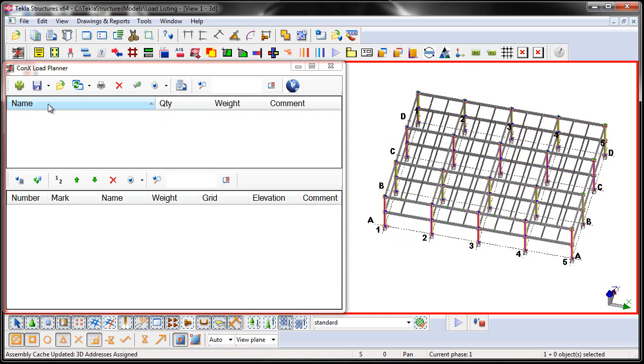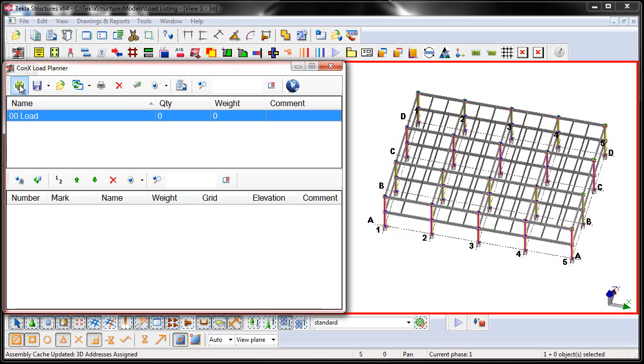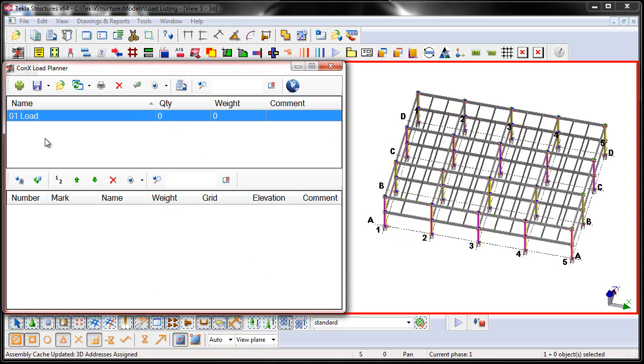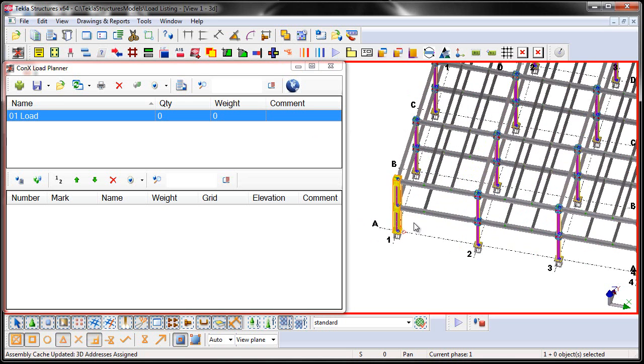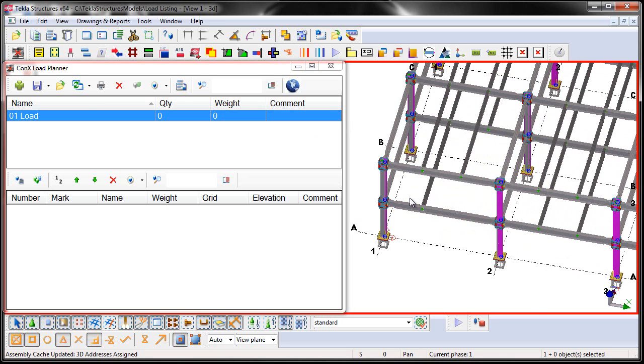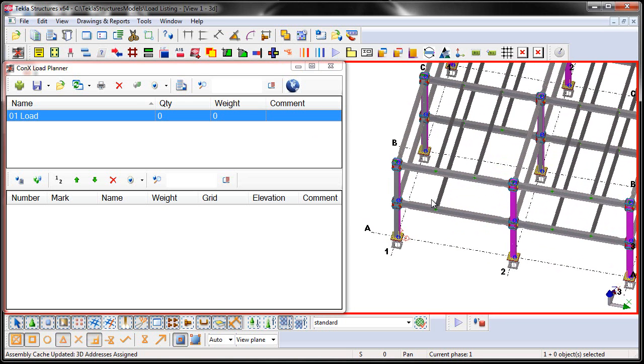Alright, the next step is I'm going to begin adding a load here in the model. So when I add a load, I can then change the name here to say Load Number 1. And currently there is zero quantity and zero weight associated to this load. Let's go ahead and zoom in a little bit closer here to the model. Alright, the next step is that I can either select assemblies first in the model and then press this button, which is going to add the selected objects to this load.